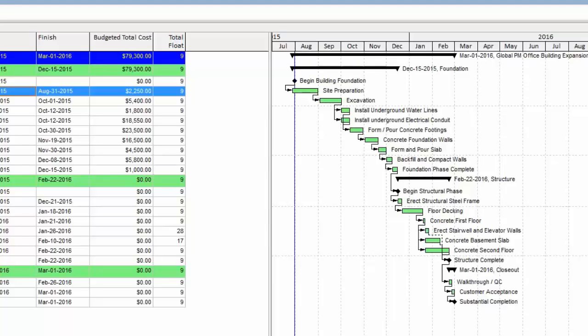As you can see, I'm scheduled to finish on March 1st of 2016, so I'm actually nine days ahead of schedule. With that said, everything is showing as green. All of the activities in my Gantt chart are showing as green. The situation is usually with the clients that I work with, even if we're ahead of schedule, we'd still like to see that longest path.